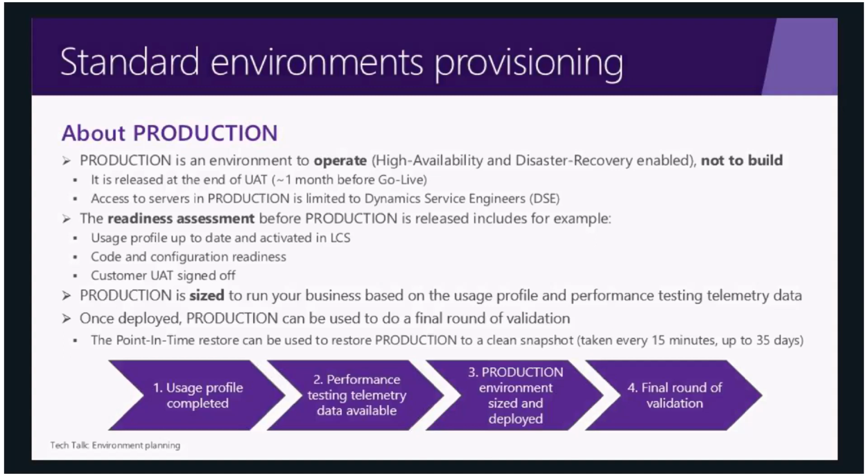So the idea would be that you have done UAT, you have received your production environment after the readiness assessment and the sizing. Now you can initialize production, do the data migration, do your final round of validation, also checking the speed, so maximum volumes.